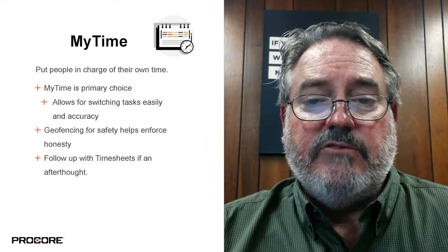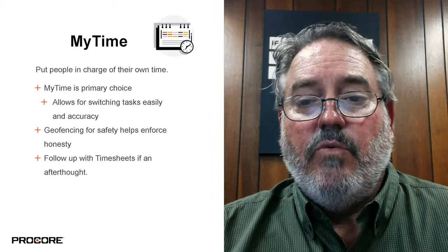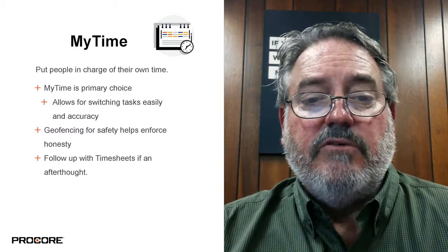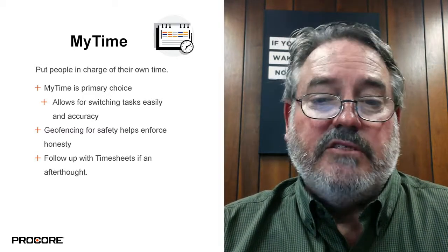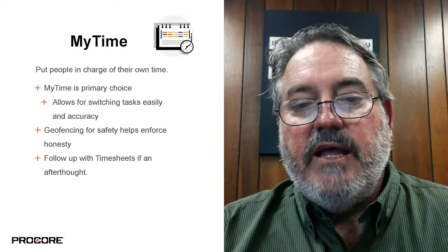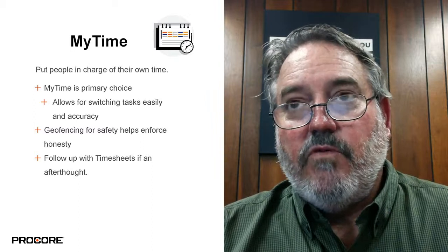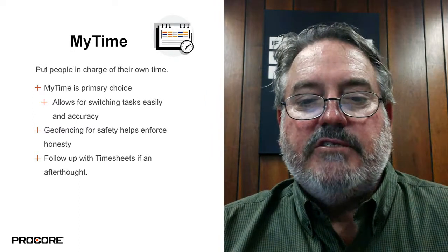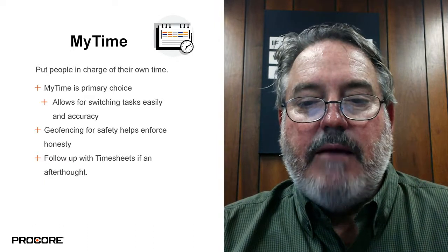Prior to starting another task, we ask that a description be entered of work completed. Once all information is input, the next location and cost code are selected and the process repeats. Different cost codes are used throughout the day as they move to different locations and perform different tasks. There is a function for entering lunch and breaks so that we can capture that time when it happens.